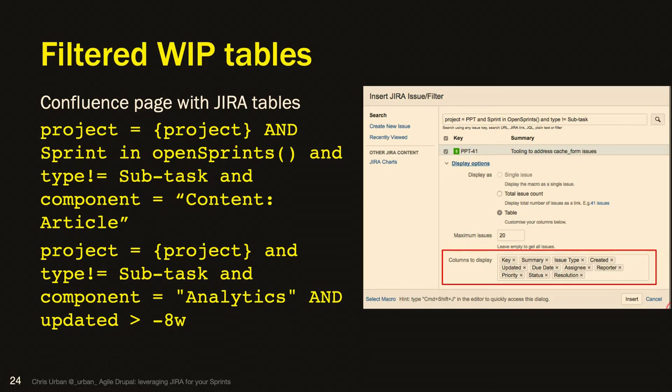There is a catch. You can track with a query that it was reopened from a specific state. You can run that it was reopened from a specific state, but native Jira will not count the cycles. So if your workflow is, let's say, ready, in progress, QA, UAT, done, that's probably the most stripped down I can think of.